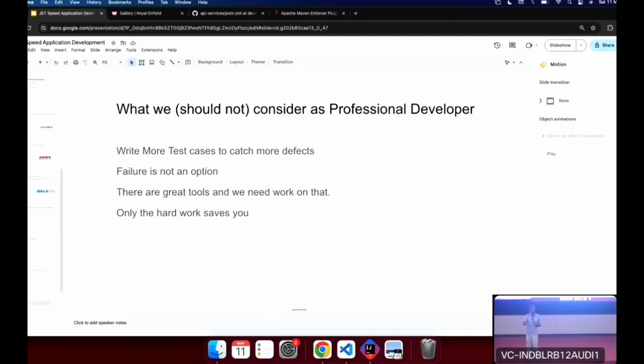We had the same problem, and our QA introduced a process called defect triage. Just before we make a release, all the developers sit together, and in some cases customers and project managers also join, along with QA, everybody. We randomly try to break our own application, and whatever defect we find, we note it and fix it there. So we save time and we track it also. At the end, the QA guy will send the items that we found and the items that we fixed. At least we will not lose track. So getting away from the tracker is not going to help.